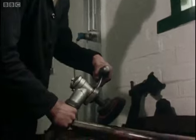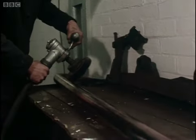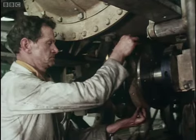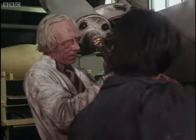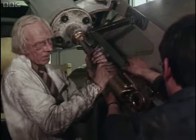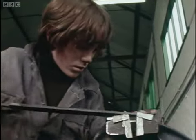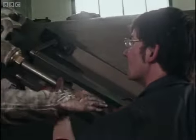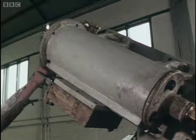If anything, life must have been even more hectic at the Stephenson works 150 years ago. George was away in Lancashire, overseeing work on the line, so the whole job of planning and supervising the work fell to his son Robert. To add to his troubles, the works were busy with other orders. There were 5 locomotives and a colliery engine on the books when work started.